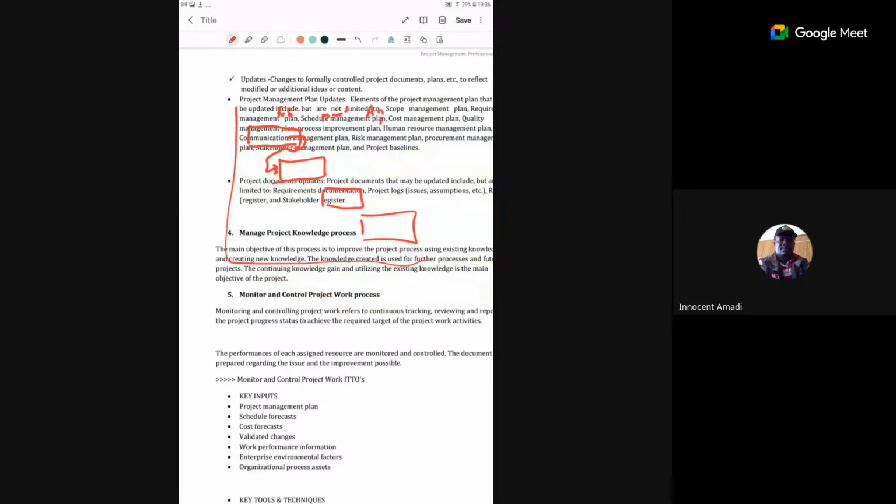So we already know that activity 1 must have started, and when you have completed it almost halfway, then activity 2 must have started, with dates. On the February line, we already see the date. If this is the 14th, we know that on the 14th our schedule is that activity 2 must have started, and it will be performed for some days. Immediately you stop activity 2, activity 3 starts. And we have seen here that you don't have to finish activity 1 before activity 2.